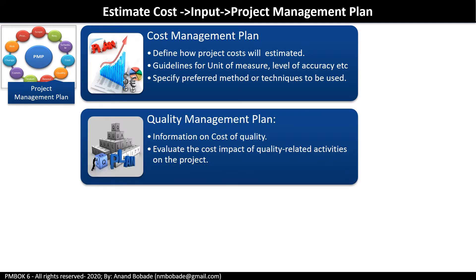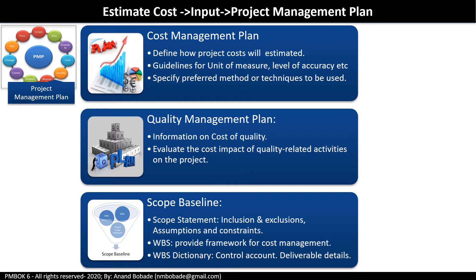The quality management plan provides information on the cost of quality. It is used to evaluate the cost impact of quality-related activities on the project. As a project manager, you need to ensure that all costs related to every quality-related activity are included in the estimation. The scope baseline contains the project scope statement, work breakdown structure, and WBS dictionary, which contains information about the work packages. The WBS dictionary will be updated with the cost estimate of each work package during this process.